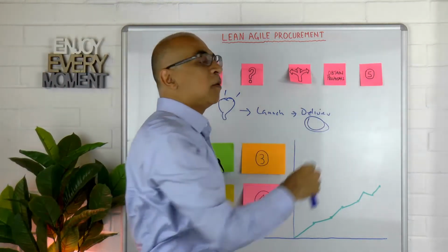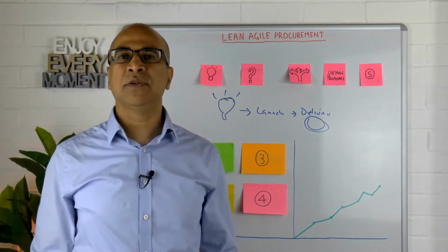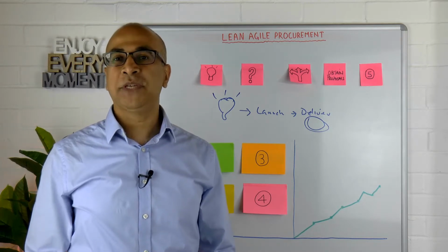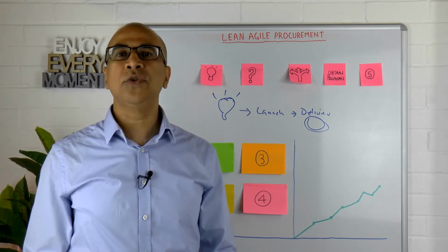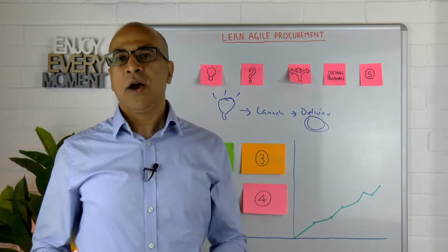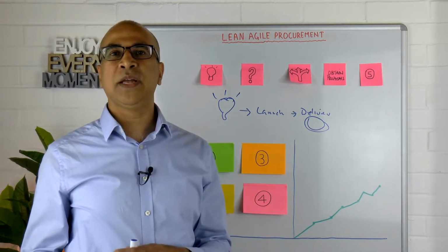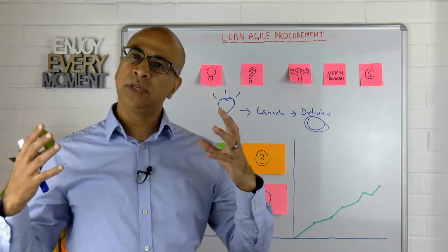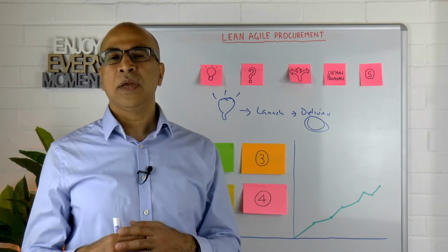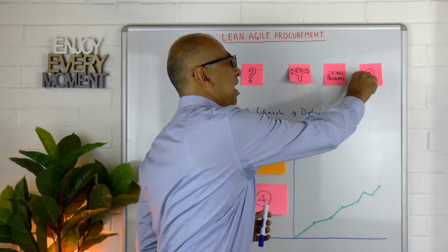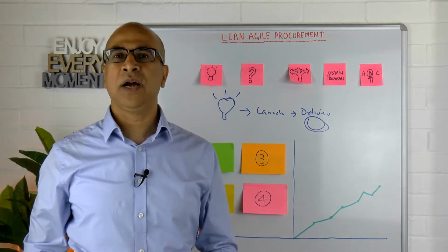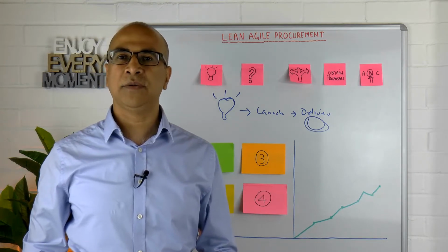Once we've done that, we might get some initial information on the different suppliers, get some ideas in terms of what we want to do, and then we might obtain proposals. So these are the solutions from the different suppliers. Imagine we've shortlisted 3 suppliers, and we ask them for proposals. This is where they give their detailed proposal, they come up with their solution, and give us some ideas in terms of how they want to do it. Once you've done that, you would then select what you felt was the best solution, and either as part of that or separately identify who the best vendor is.